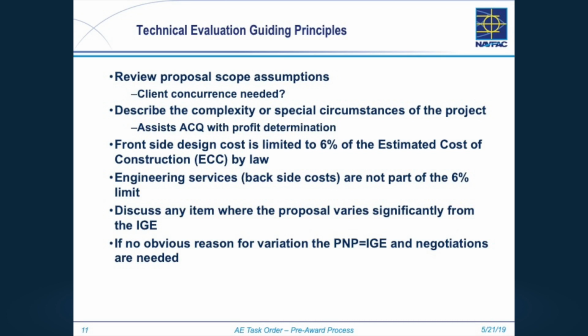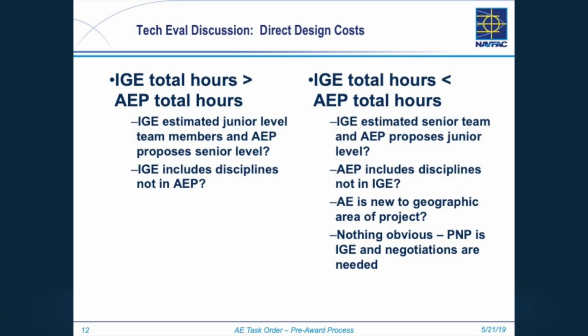Now, when you get into discussions, they're going to state their case, and you may say, ooh, I didn't think about that. That's okay. That's what the whole discussion process is all about. A few things I gave you just thought process. Your initial look at it, you've got more hours than the AE does. Is that right or wrong? I don't know. But some things to look at, did you estimate they were using junior level people and they're using senior level people that are more productive? That could be the difference.